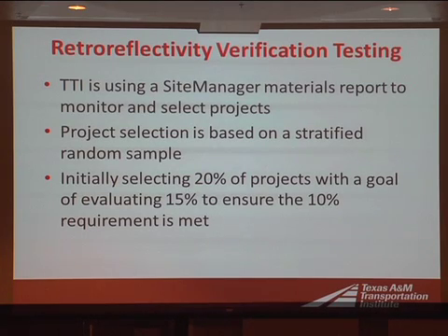So how are we determining what projects we're going to do, where we're going to do our data collection? We're using a Site Manager materials report to monitor and select projects. We're working with the construction division on this. Darren Hazlitt, Johnny Miller, I see John Bassett standing in the back. We're working with all those guys to figure out which projects we need to be monitoring. So we have a spreadsheet set up in Site Manager that we can go to and update as new contracts are put out. And then we select a portion of those and add them into our pool of projects that we're going to verify.